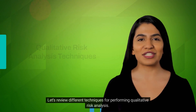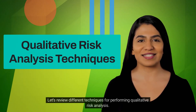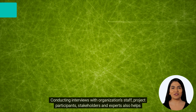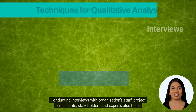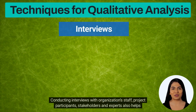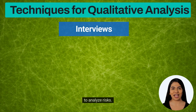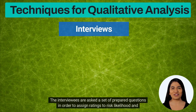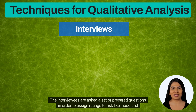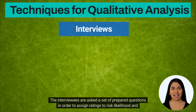Let's review different techniques for performing qualitative risk analysis. Conducting interviews with organization staff, project participants, stakeholders, and experts also helps to analyze risks. The interviewees are asked a set of prepared questions in order to assign ratings to risk likelihood and impact.